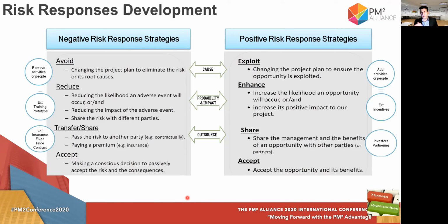And on the right side, you have exploit, as we said, when you try to make the probability of an opportunity 100%. You have enhance, where you are trying to make the probability and or the impact become bigger. And share is when you bring someone else, a third party, onto your project in order to try to make an opportunity happen or to gain more from an opportunity.